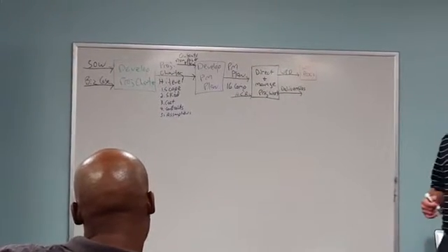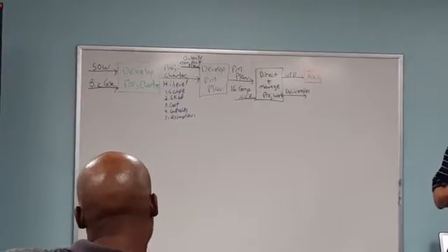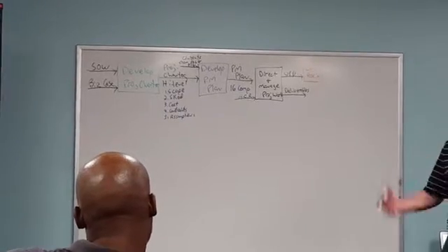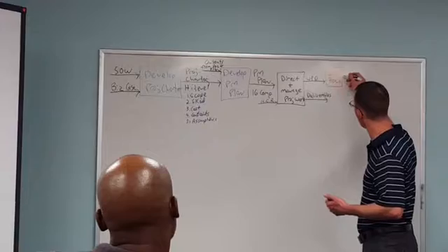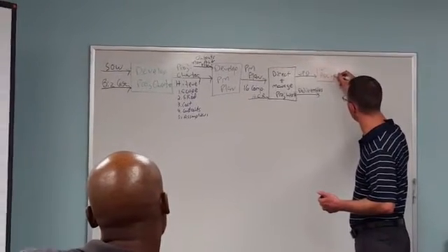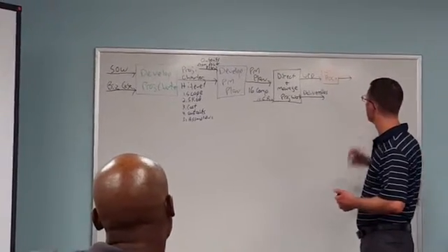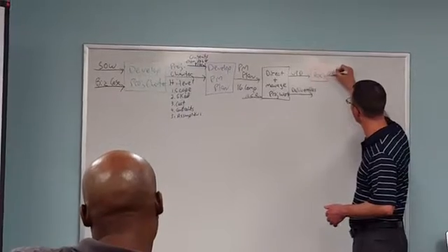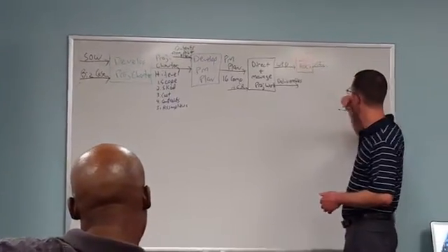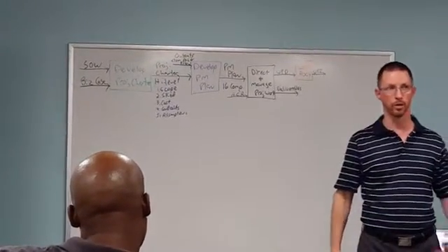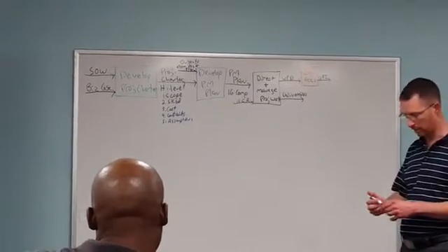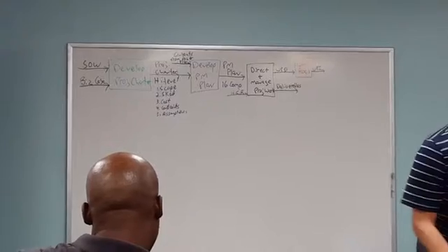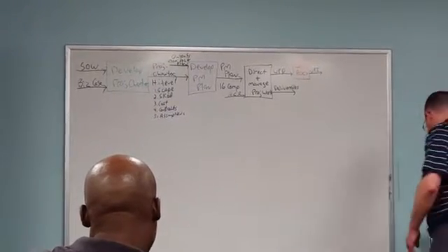Reports? No, not reports yet. Information. Right, I analyze and I turn it into information, which means it is some sort of added detail. So it's going to become work performance information. All right, now what do I do with that work performance information? Monitor and control project work. That's correct. I'm going to send that to a process called monitor and control project work.